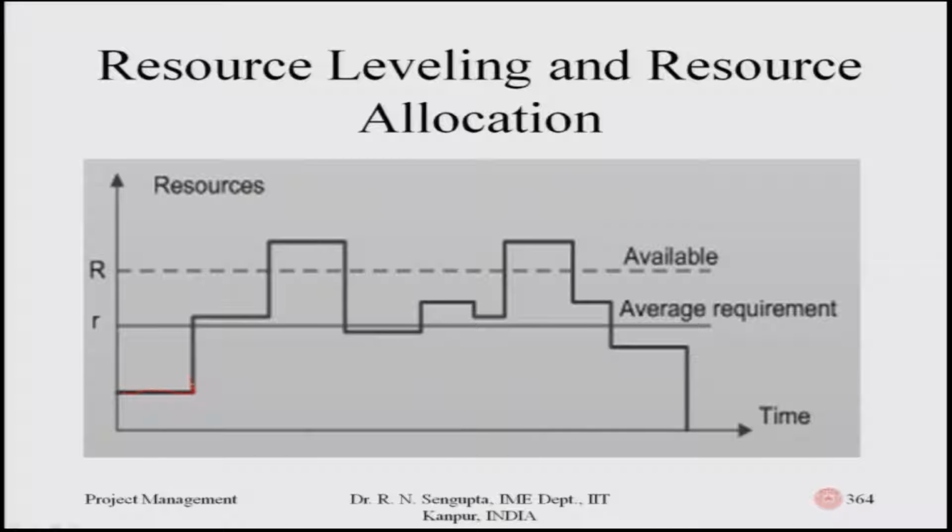So, if you see this graph, this is the sort of step function which you have, where I am moving my pointer. It basically means that the resource usage is in such a way that you will have 2 areas which need to be taken care of. The first area, which I am now highlighting with my yellow highlighter, is the set of areas at some point of time where you think you will be utilizing more than the required maximum amount of resources.